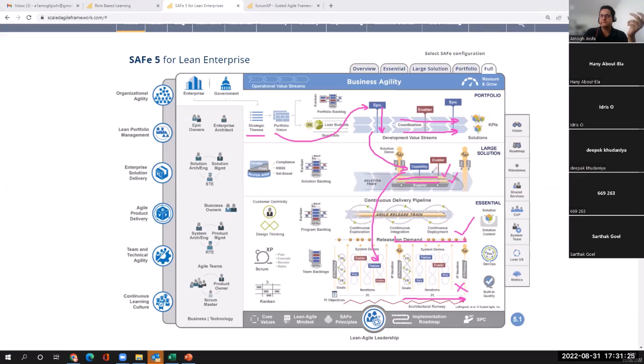That's a capability. A feature is almost the same thing, but it requires only one train. So a feature can be very simple, like capability: enable passengers to buy extra baggage via mobile app. Now it is only one train, via mobile app. Now, only one train is required and it can deliver in one PI. Then we have a feature. And features are further divided into stories. Stories are something that can be delivered within 2 weeks. That's the story. When we say 2 weeks, it is the maximum time that it should take.